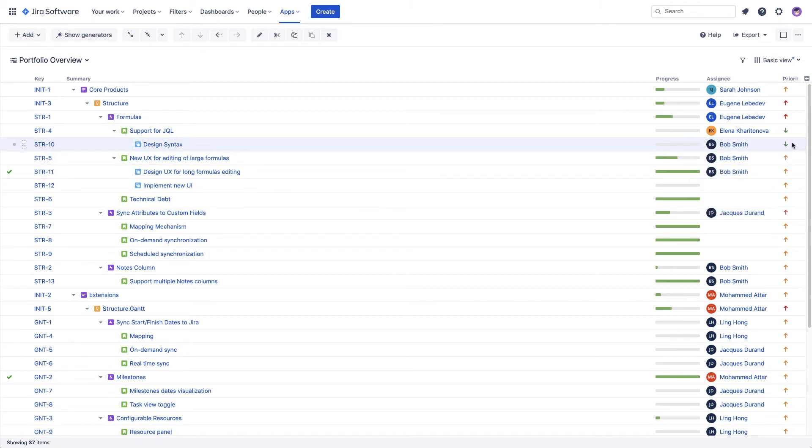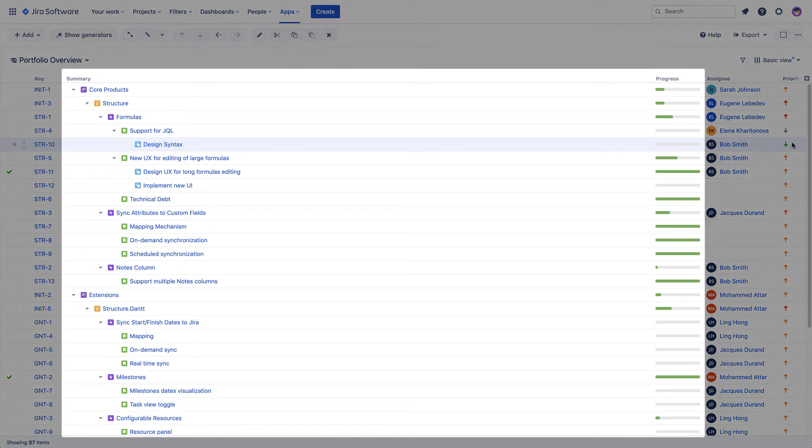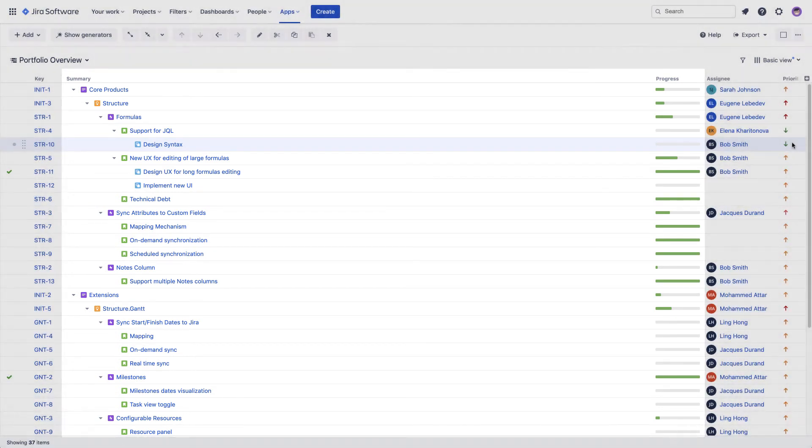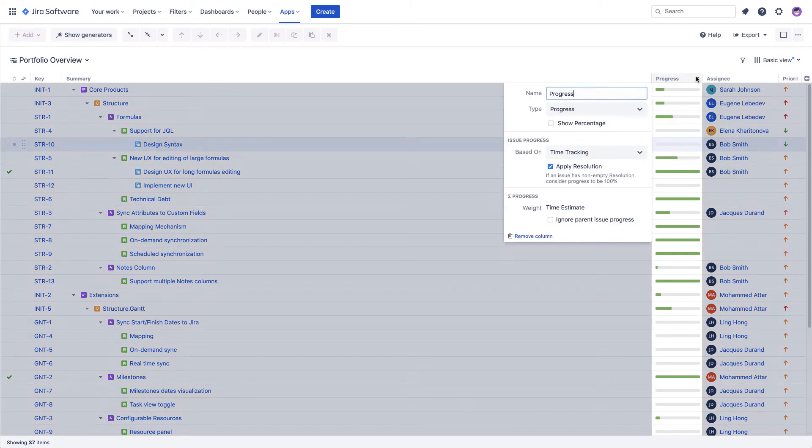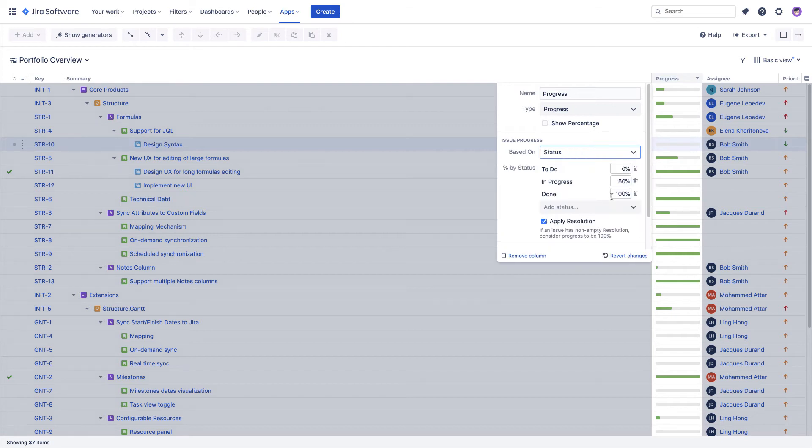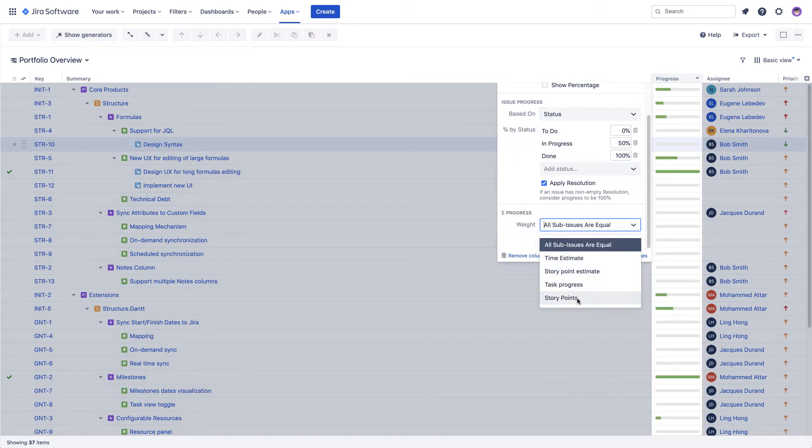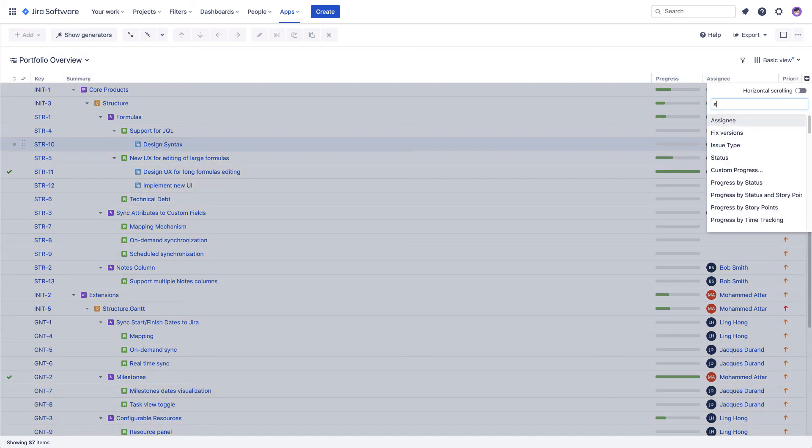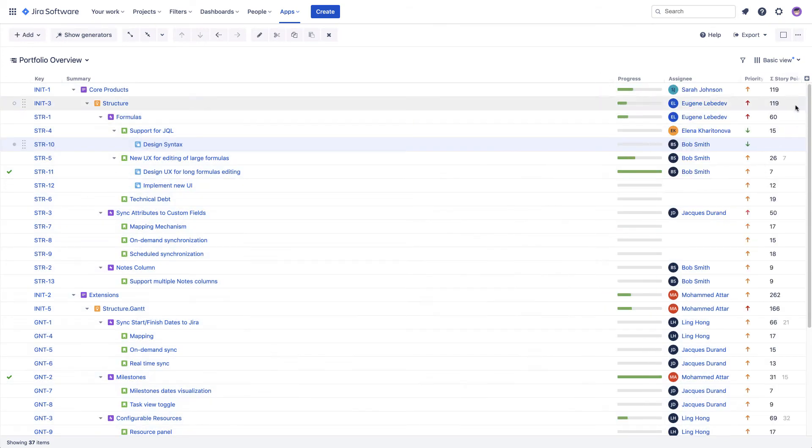This makes Structure a great tool for all kinds of tasks where you need to work with a large number of issues at the same time. Apart from standard Jira fields, Structure offers a number of custom columns. The progress column allows you to calculate progress across your entire hierarchy based on different types of Jira data. You could use time tracking data, or if you don't track time, you could use the statuses of Jira issues weighted by story point estimates. You can also easily aggregate any numeric field, such as story points or time spent.